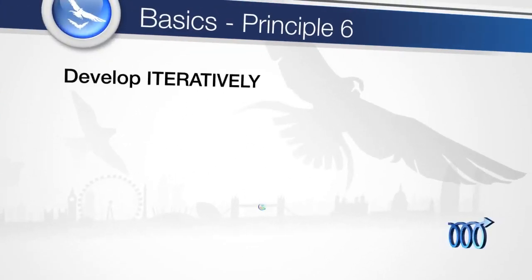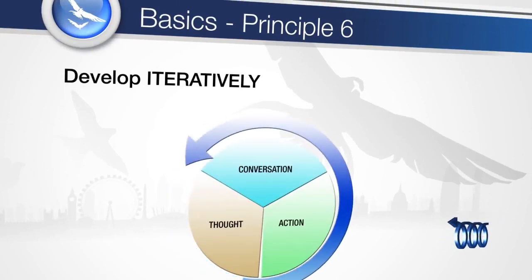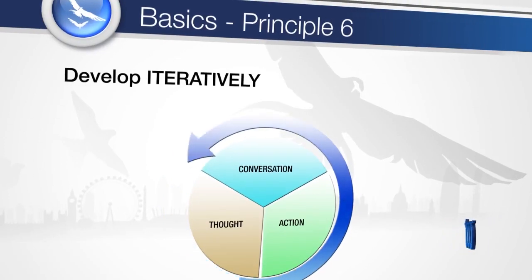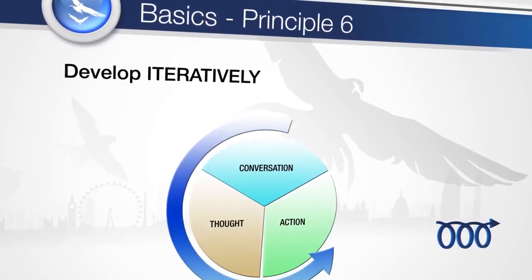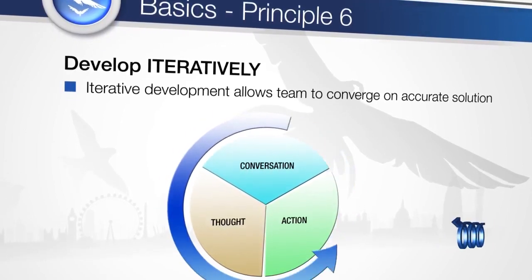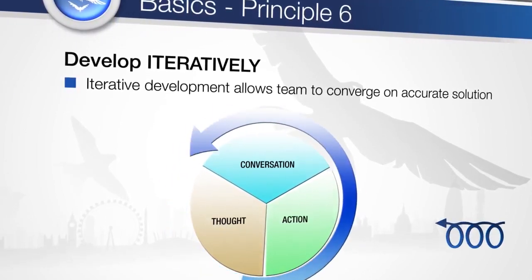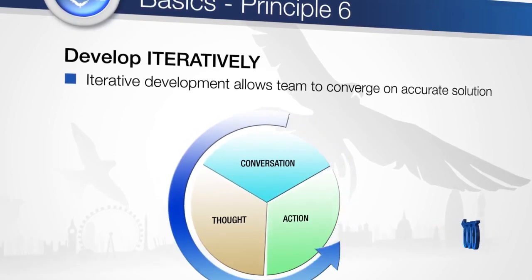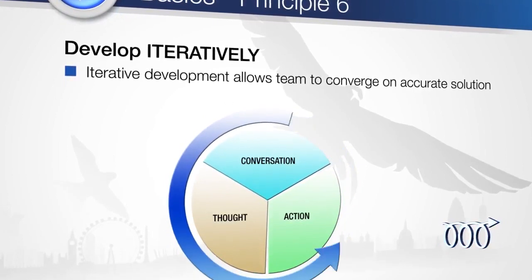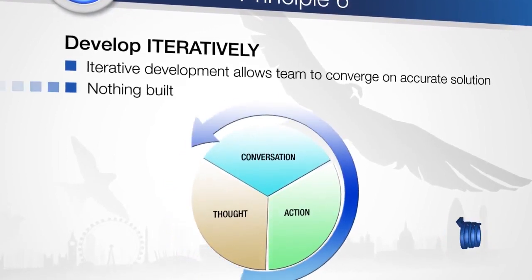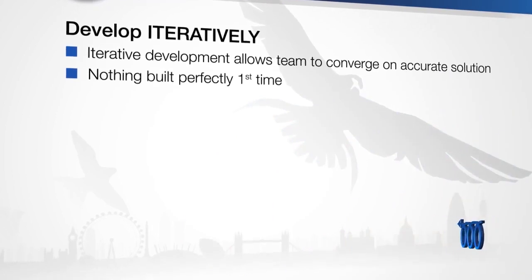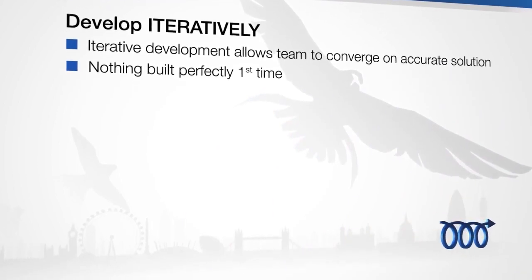Where incremental delivery is about delivering smaller portions at a time, iterative development is about developing through repeated cycles, often adding more functionality to the product. Multiple iterations repeat or return to create a fully integrated product. For example, a website may allow payment by credit or debit cards, but the ability to pay by PayPal may be added within a later iteration. The concept of iteration is embedded throughout the life cycle, down to the lowest level of development time boxes.